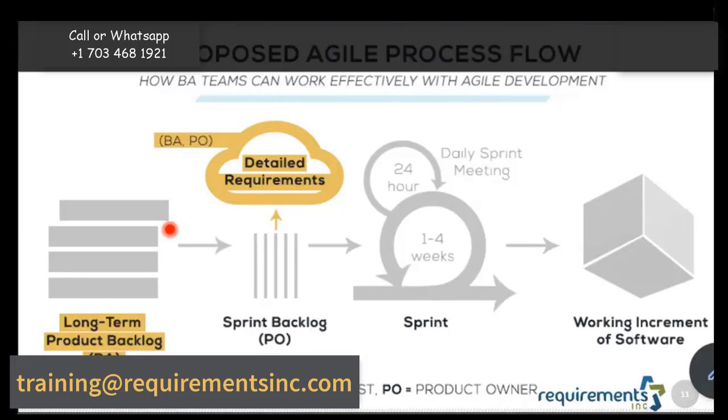What is acceptance criteria? Okay, so I have a sheet of paper. The title of that is written in nice big font. And within that title, there are multiple bullet points. Each bullet point says details about what exactly needs to be done. Remember the sticky notes where the developers and testers and BAs put together to ensure what needs to be done to meet your definition of done? This bulleted list is the information needed for them, right? Because you can't simply have a title and then expect them to know exactly what to do. So we write out in as much detail as we can what are the things that are intended within the title of that user story.